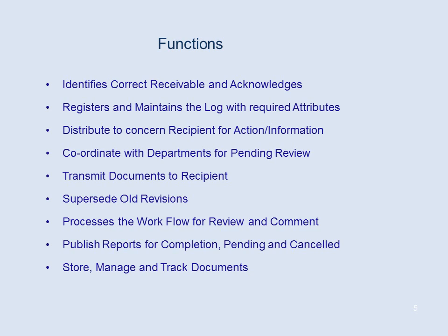Publish report for completion, pending and cancelled. Once in a month or as per requirement, the document controller shall generate a report which will show what is completed, pending and cancelled. Why should he do this? Because the project team will get alert for the things which are getting delayed and might affect the work on the project.